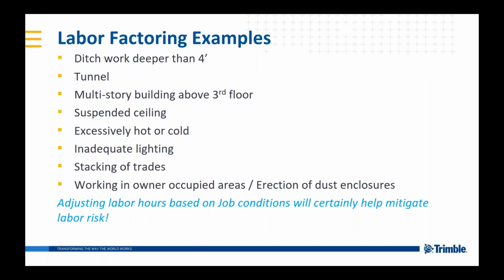So here's some examples of when to apply labor correction factoring, additional to what we just talked about: working in a ditch deeper than 4 feet. Working in a tunnel, that's kind of like working in a crawl space. Tunnels can be tricky. They usually have horrible access, and getting material and tools into them can be tricky sometimes. So I'd certainly apply some type of a factor for working in a tunnel.